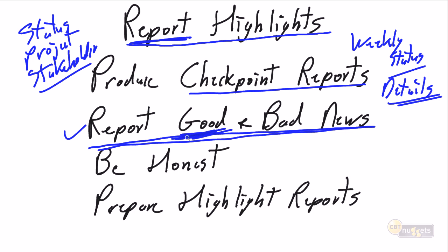Unfortunately, I don't get to produce a lot of really fun status reports. I seem to, and maybe I'm just a bad project manager, but I'll say not, that I believe this is a characteristic of IT projects. There's often a lot of bad news we have to produce. And it's our job as project managers to be willing to report bad news, and to report bad news honestly. Now, we know we have management by exception, and anything that's plus or minus 10% is within our capacity to manage, action and resolve. But that doesn't mean we shouldn't be reporting.